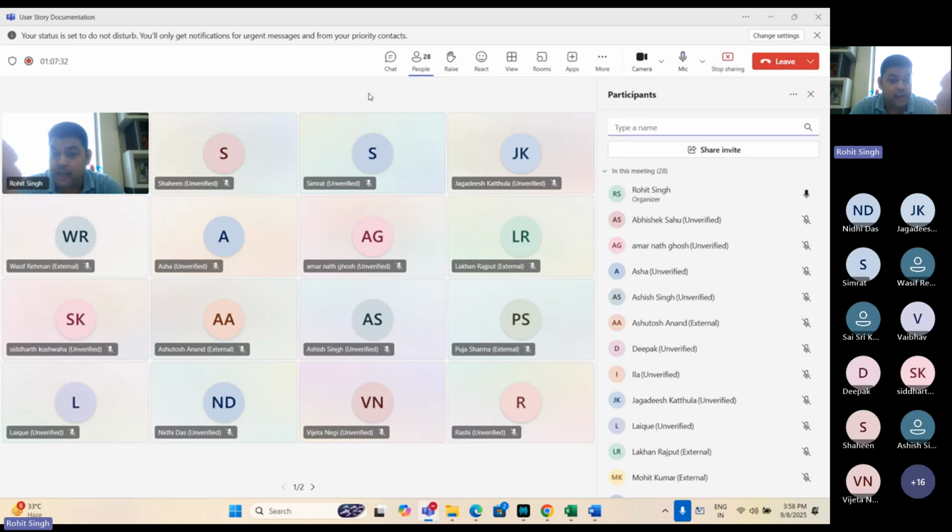If I am an admin and I am using the same paid leave feature, I am using it for the database and storage for the system audit log, so that I can collate the data on whether Rohit has applied multiple times or a single time, or how many times. So now you can see that a single paid leave feature has been used by different business drivers in the product or service with different accessibility and different acceptance criteria. So when we are writing the user story, we have to write it from the different business driver perspective as per their accessibility and as per their acceptance criteria.